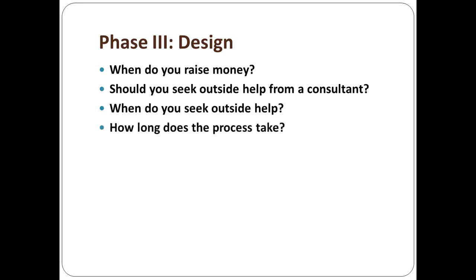How long does the process take? From the time you start to consider who you're going to interview to hire to the time you get your pledges back, you better figure on 9 months. What will it cost? Well, I've seen projects done in the last 5 years with 200 people and maybe a giving record of $1,000 per person. So 200 people times $1,000, $200,000 budget, was $25,000 to do a capital campaign for a consultant. And I've seen it all the way up to $110,000. Not for a church of 200.